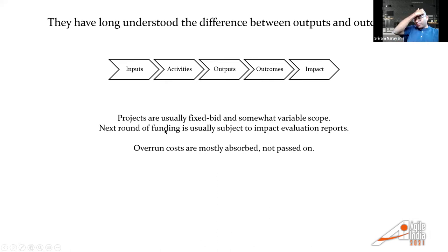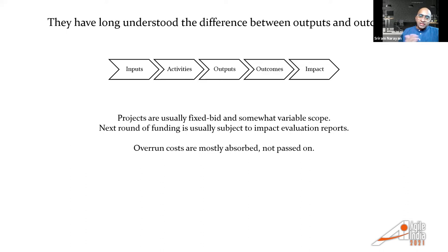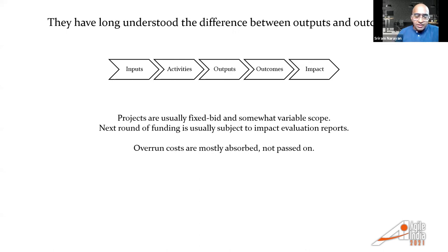Projects in this space are usually fixed bid but somewhat variable scope — the funder says I'm going to spend so much money for this kind of program, but there is some scope variability subject to the funder's discretion. They might say, I agree you've met this milestone, so I'm releasing the next tranche of funds. Therefore overrun matters — if effort or schedule overrun happens, the implementer has to absorb that cost. The funder most of the time is not going to cover a 20% effort overrun or 30% extra time.